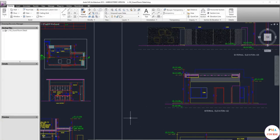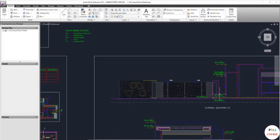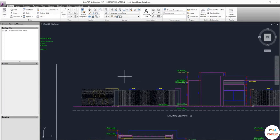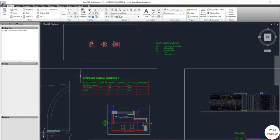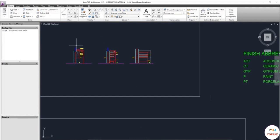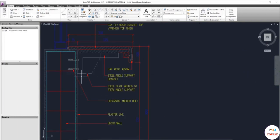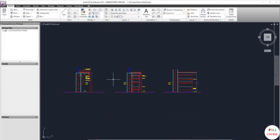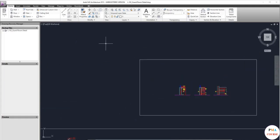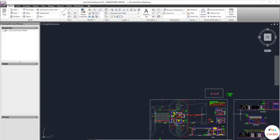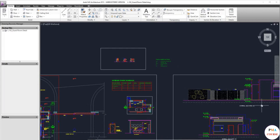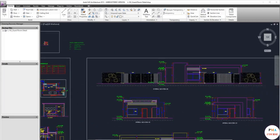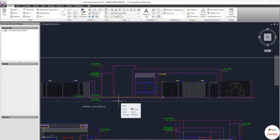Hello again. What's missing? You know that the facade works are missing and there's not much detail. There's only an interior finishing schedule, but if you check these sections, there is no information about the facade works. It's metal louvers shown here and the rest is GRC. This is good because it's two types, two materials, and most probably two subcontractors.